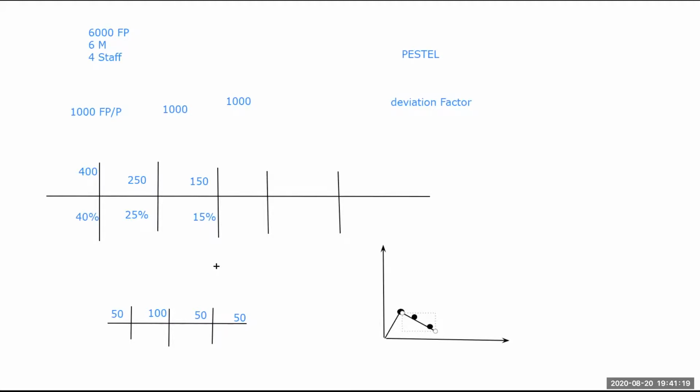Also, the second problem here: your target should not be static or fixed. Your target should be bringing everything together. Let's say, for example, when I distributed only 400, I should divide the 5,600 over 5 months, not keep a fixed target like 1,000, 1,000, 1,000. On the remaining, I will have, let's say, a lot of my overall target not achieved.